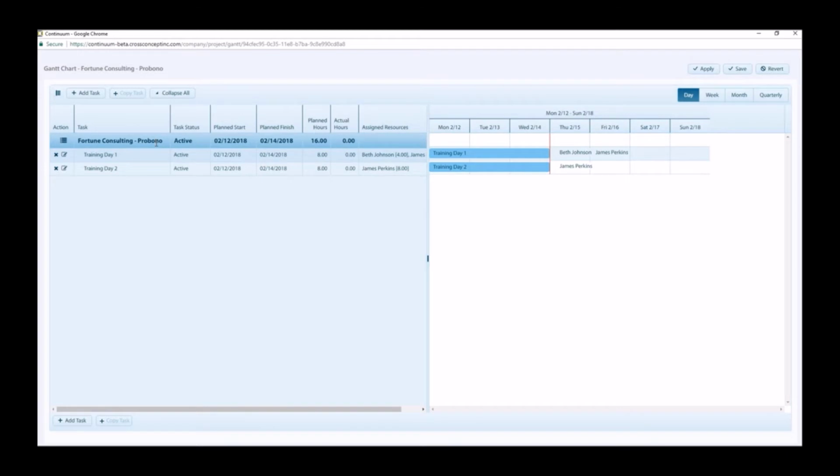This row is not editable since all these values will be calculated based on the information we enter under its associated tasks. A project can have parent tasks and child tasks, which will be conforming the actual work breakdown structure. To expand and collapse this full structure, we can click the Expand All or Collapse All button at the top.